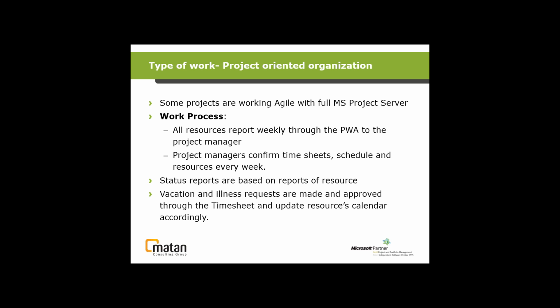Project managers confirm timesheets at the end of the week, and that's the way they have the burndown charts, the burn up charts, team velocity charts, and so on. The status reports are basically based upon the reporting of the team members, and they also report vacation and illness and all that kind of stuff, administrative time, through the system as well.